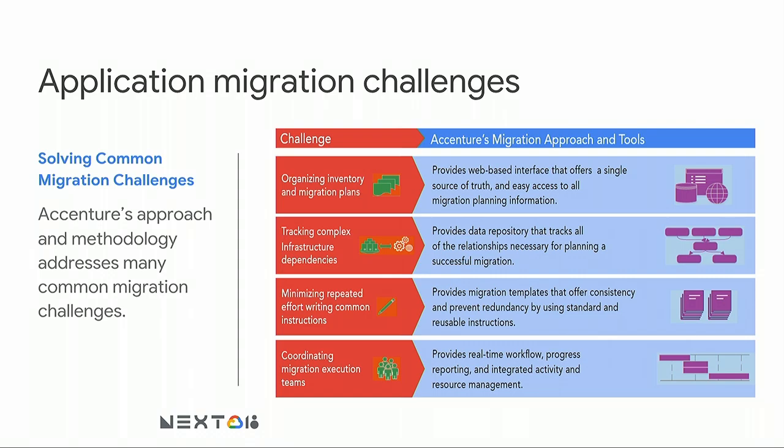And then that really leads us into the next challenge, which is understanding the dependencies between those. Which applications use which servers, which ones are divided out into your different environments between your non-production and your production environments. And then probably more importantly for migration and dealing with some of the additional network latency that we take on when we move to cloud is understanding these application-to-application interfaces. So when you move one application, what's the impact going to be to the end-user experience, and is the application still going to be functional?